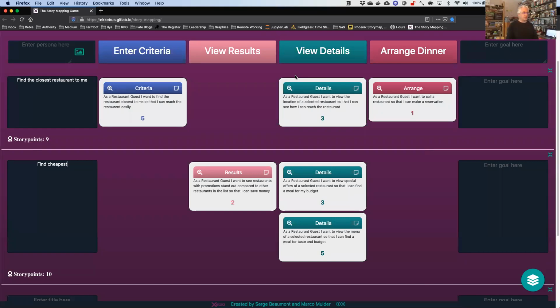And you might also imagine that if you were talking with your stakeholders, you want to be talking at this higher level. Let's say I was your product owner and you are my customer, and I would say, look, Alberto, what would you want first, right? We could reason about those 2 higher level concepts instead of going through every single lower level user story. So this is also really nice to communicate at a higher level with your stakeholders. It also protects teams from stakeholders going through all this low level stuff, because then you get micromanagement, and you don't want that.